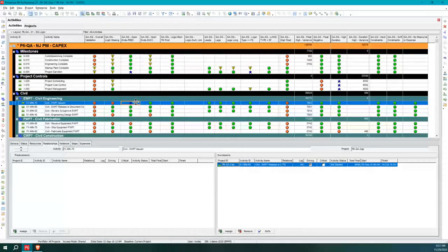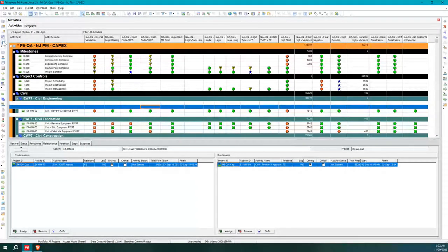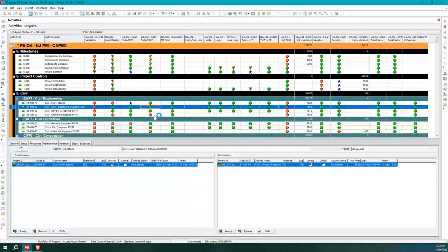If I use this blue star, this is saying that I have physically looked at it, and I don't want it to be counted as a problem because it's okay. We have evaluated it and it's all right to have that. Okay, so you may have the same thing with the successor. Oops, sometimes this does a strange thing to my layout. Let me just save that. So same thing on the successor. Perhaps you're comfortable with this having no successor. Now you need to be much more careful with those, of course. Anytime that we've evaluated a particular point, analyzed it, and we're comfortable with it and want it not included as a problem, we can use this blue star. Okay, so you can see here I did it here as well.